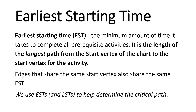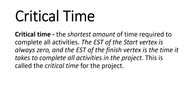We use earliest starting times and latest starting times to help determine the critical path. The critical time is the shortest amount of time required to complete all activities. The earliest starting time of the start vertex is always zero — that is the vertex at the beginning of the diagram. The earliest starting time of the finished vertex is the time it takes to complete all activities in the project, and this is called the critical time for the project.